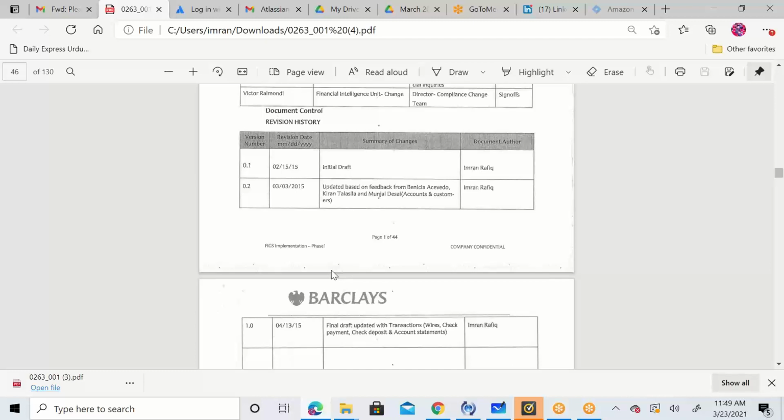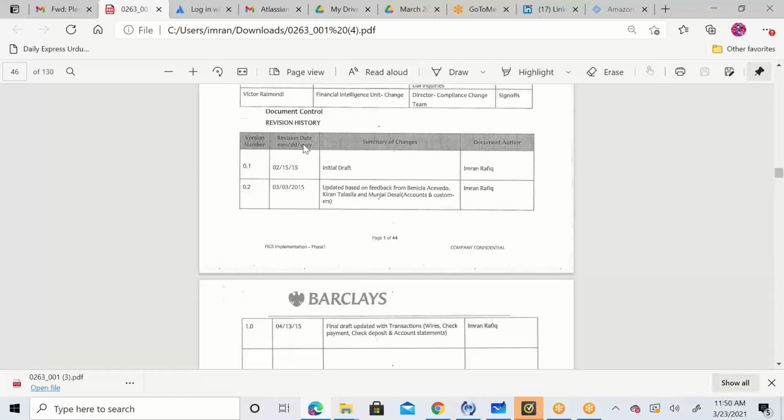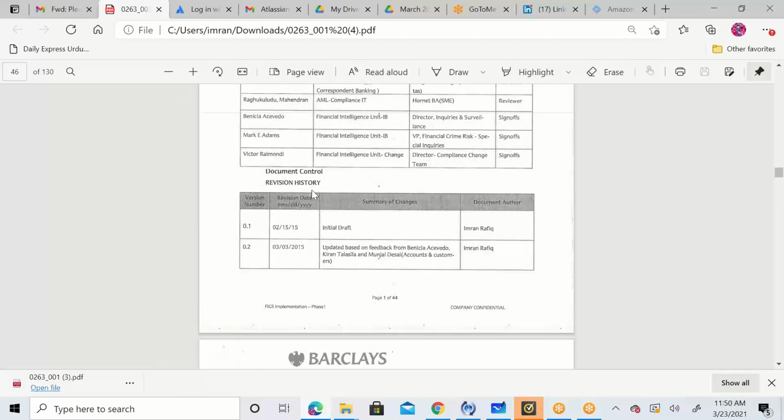So there is a right time, and the right time is when you are going to get review and sign-off approvals from them. They have to email you, they have to tell you if they agree or if they don't agree. And if they don't agree, then they will highlight the areas and let you know that this is what we did not agree upon. So you can set up a meeting with them and clarify further what it is that you want me to do. And then eventually once that is taken care of, you can get sign-off and approval again from them. So that last email, the sign-off approval email, is important. And any other discussions which you have with them, you can simply put on the revision history part.